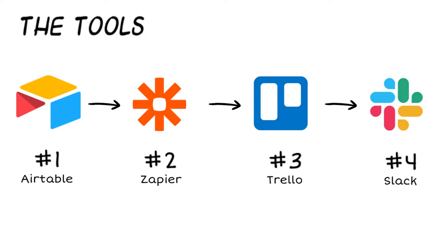Zapier is an automation tool for moving data between web apps, and we used Zapier to move data from Airtable into Trello. We used Trello, a collaborative project management tool, to organise the tasks. Once they've been created in Airtable and pushed as individual cards to Trello, we used the Trello board — set up in an agile way using a Kanban approach — to manage the project.